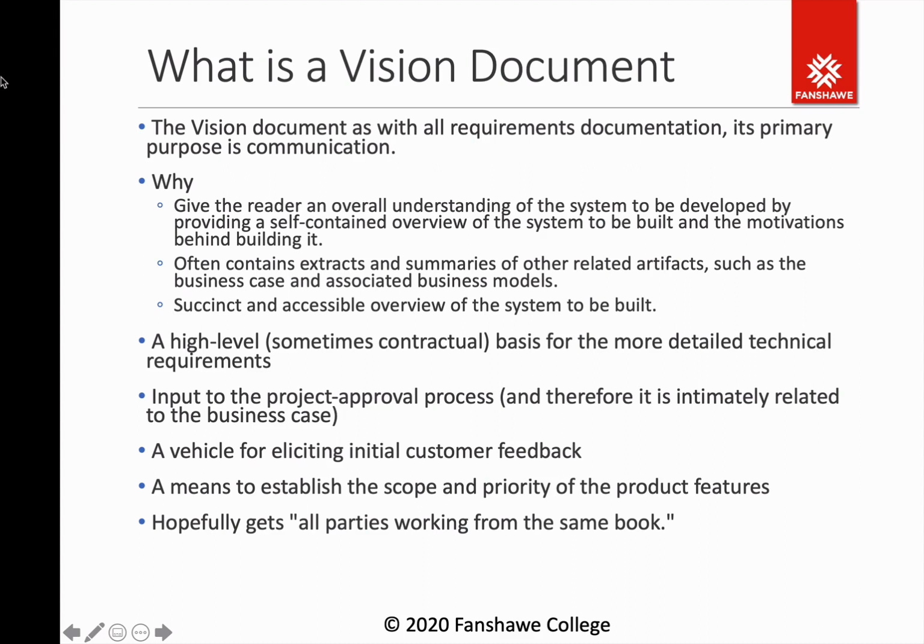So when you build applications today using agile approaches or more modern engineering techniques, we generally don't try and build the system all at one time. We generally try and build the little part of the system that provides the most amount of value. We usually build that first, and then over time, we enlarge the system by building on the basic foundation, adding more and more functionality, and ultimately end up with a complete working system. Hopefully, we'll get everybody on the same page.